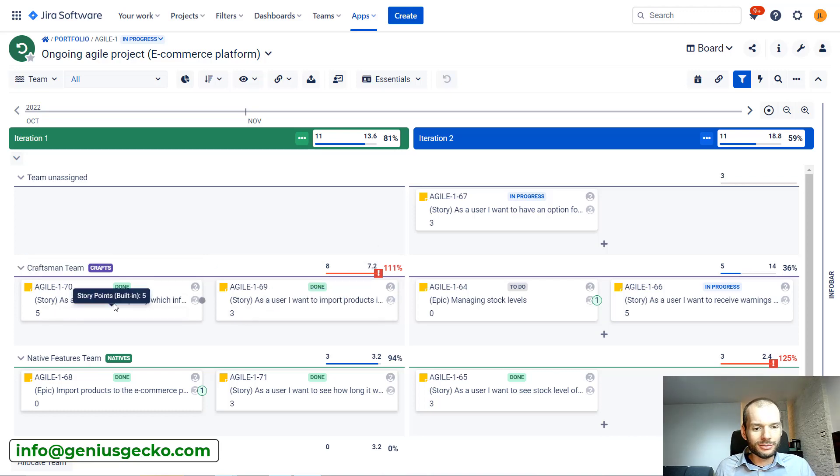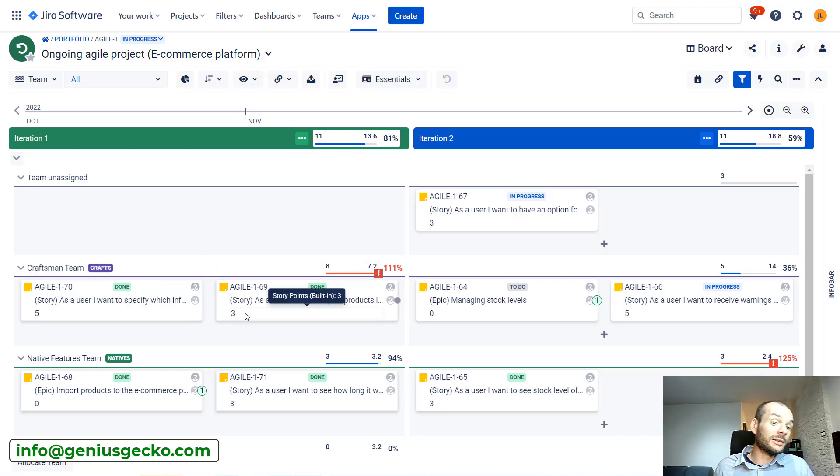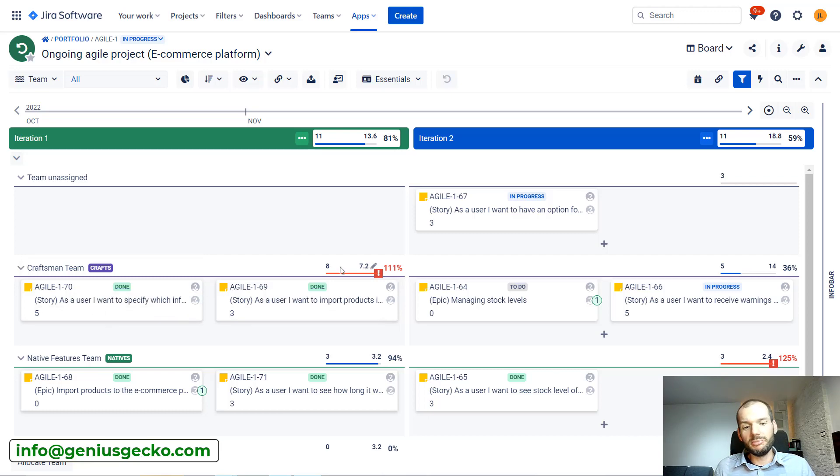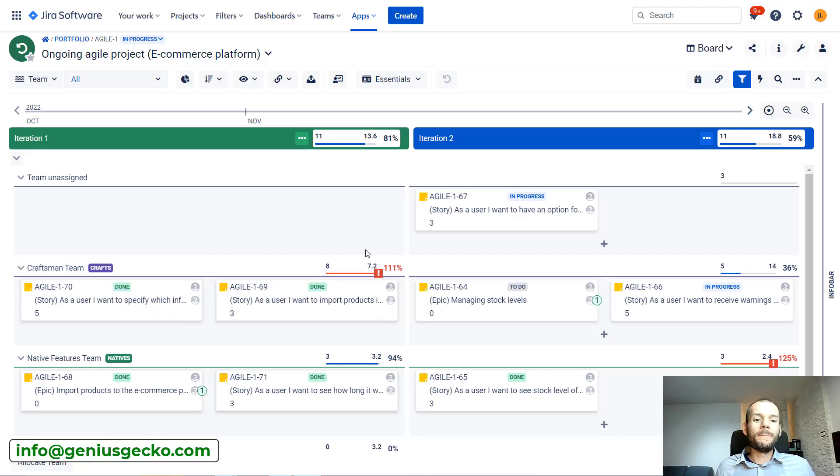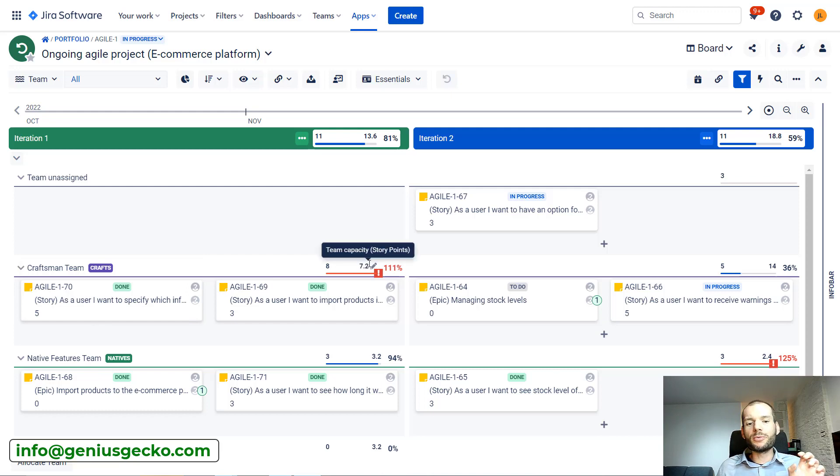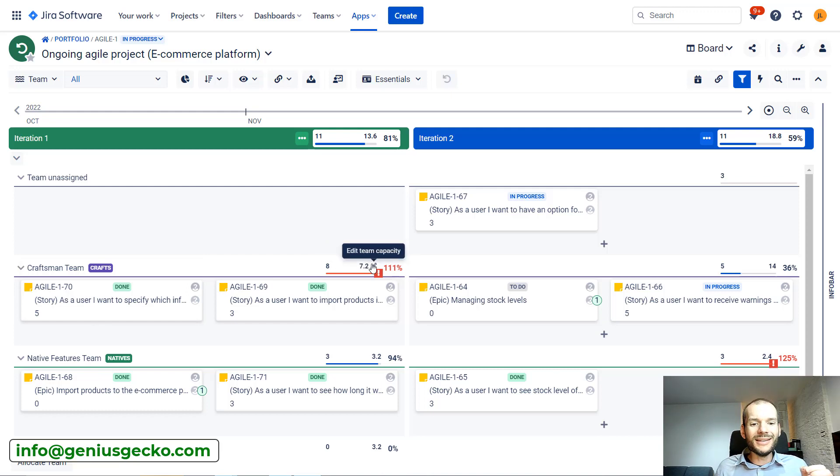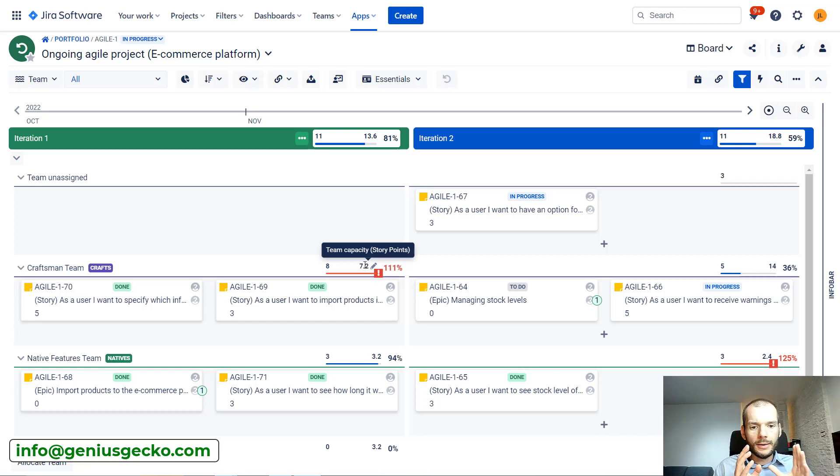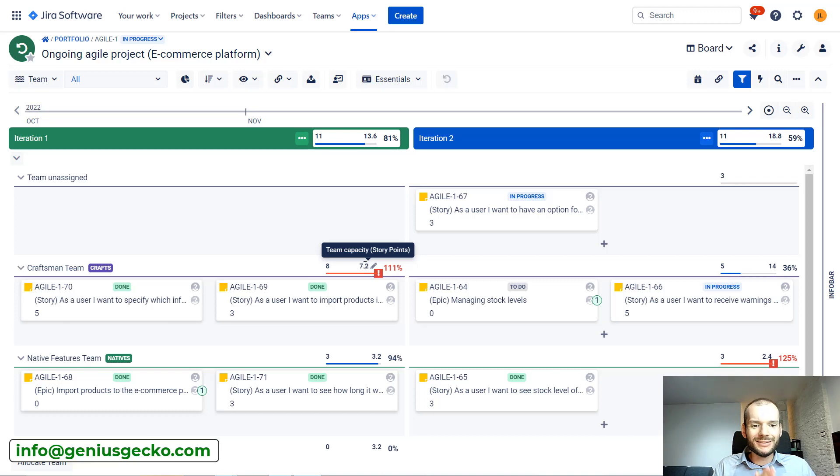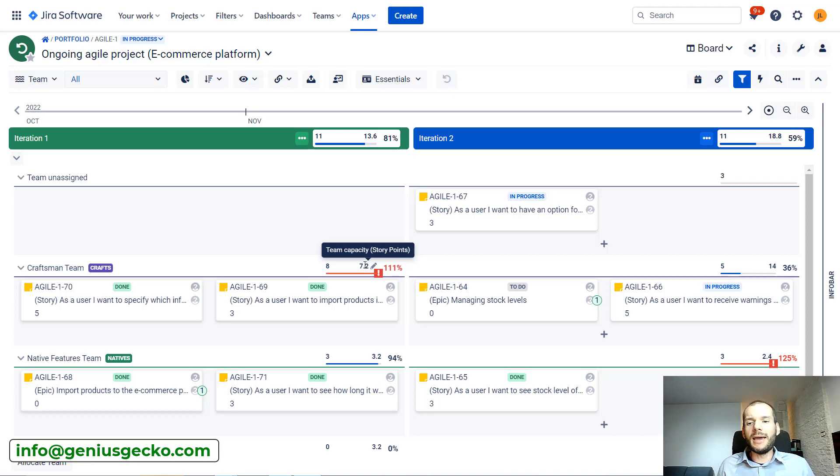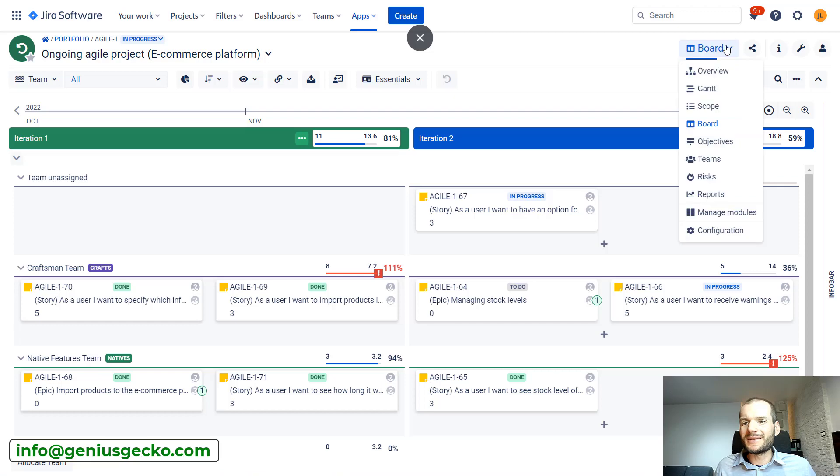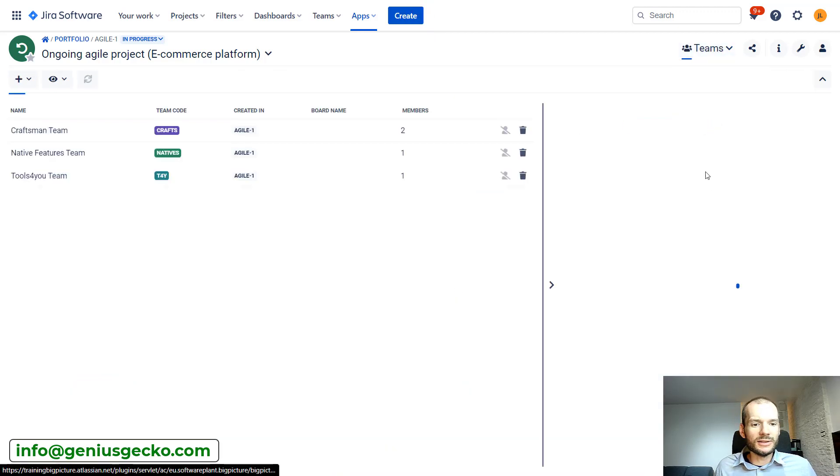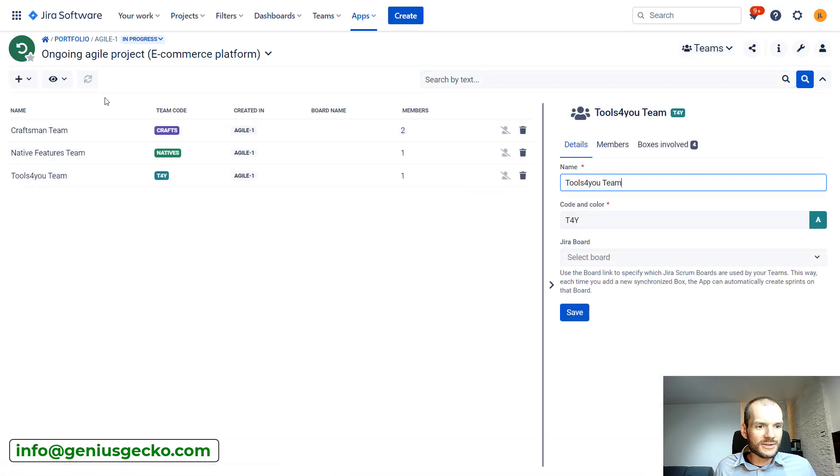I think that for allocated work this is pretty straightforward. It comes from the tasks. You can see over here I have two tasks. One of them estimated three story points, second one five, in total eight. So this is pretty straightforward. But things get interesting when we look at the capacity. This capacity is initially calculated by Big Picture. You initially do not have to set this up. This is based on the teams and their capacity.